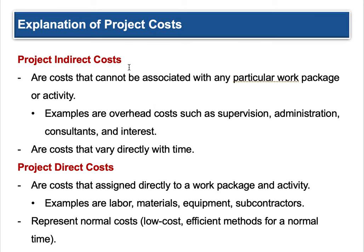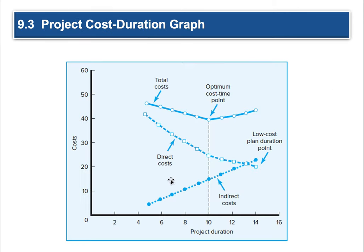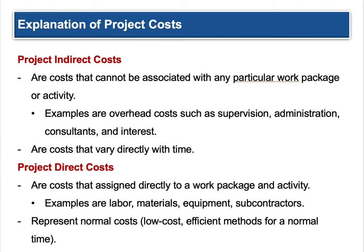You've got costs that aren't tied directly to the project and costs that are. Either way, whether indirect or direct, you're going to have an optimum point where you need to wrap up this project before costs start going back up. And a lot of times that's driven by indirect costs. As a project manager, your direct costs are getting lower — you're doing a great job — but because of things out of your control, the indirect costs mean you need to wrap up the project sooner. You need to crash it.